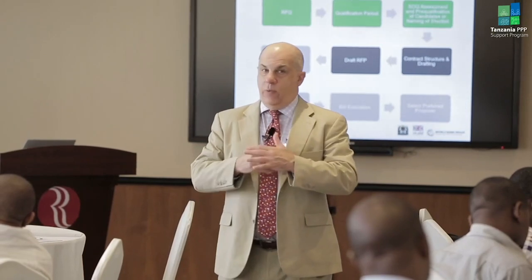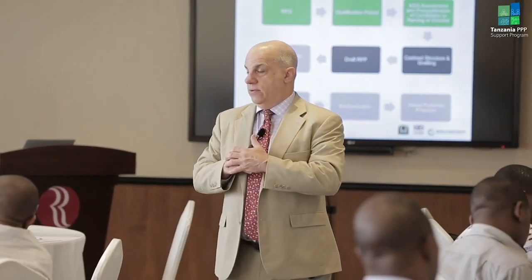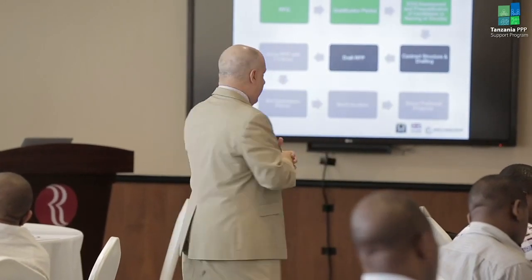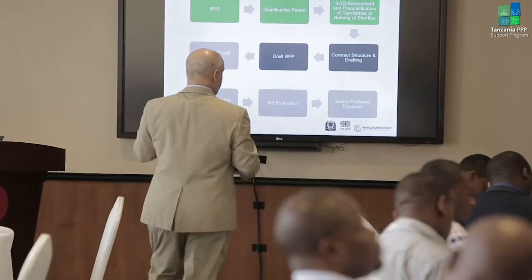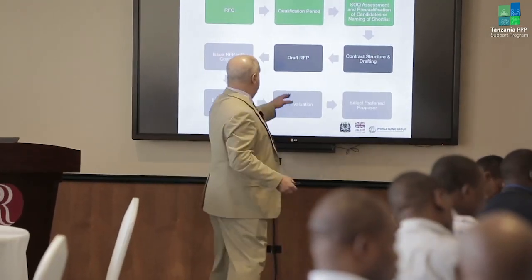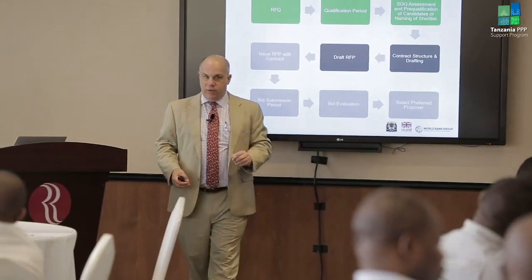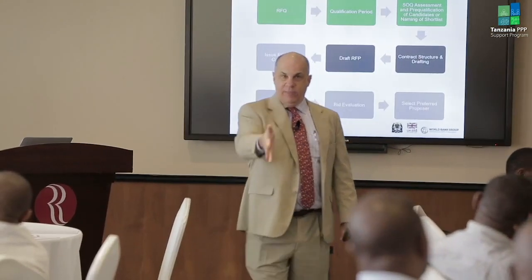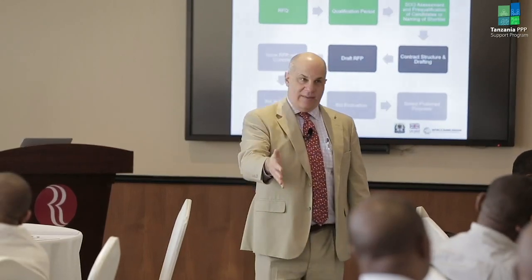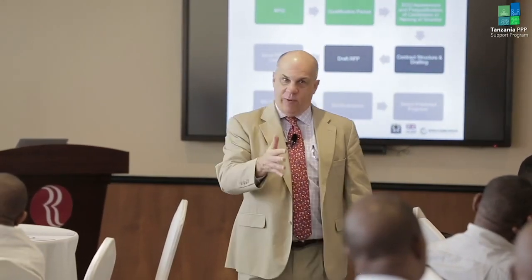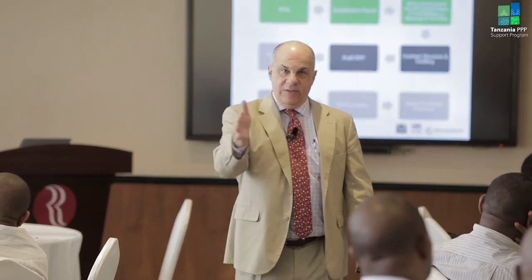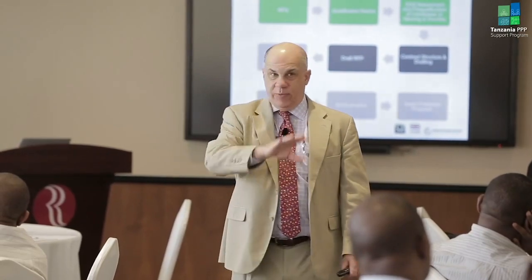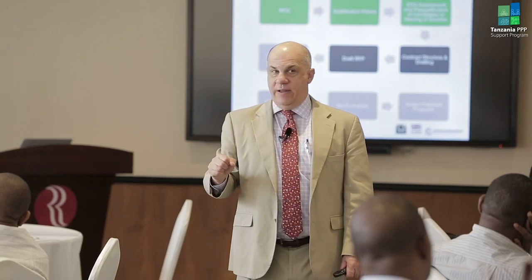But at some point, you want to make the contract final. And the other big advantage is when we have the 3 or 4 firms on our short list submit their proposal, they're all submitting to the same contract, the same terms, the same length, the same payment requirements, everything. So now you can judge all of the proposals on an equal footing.